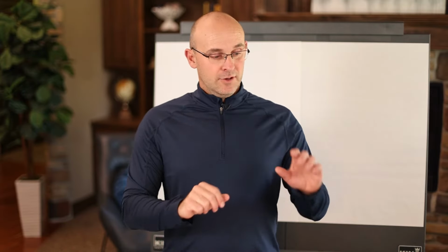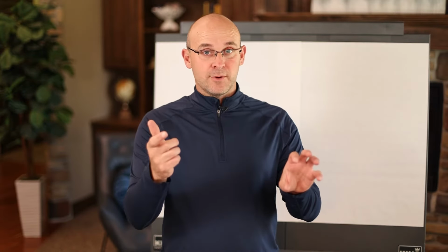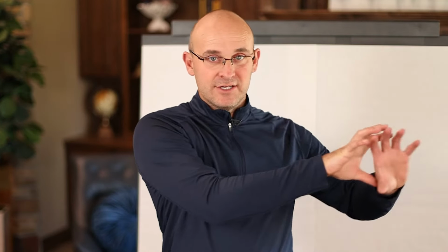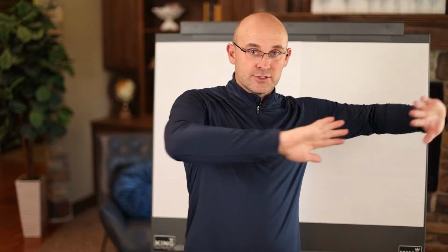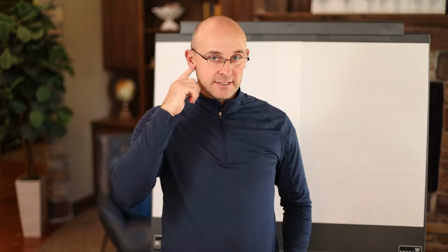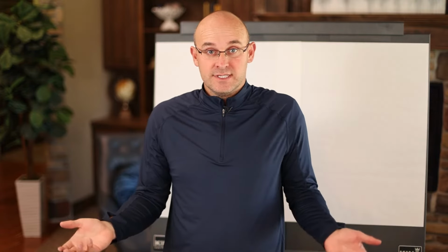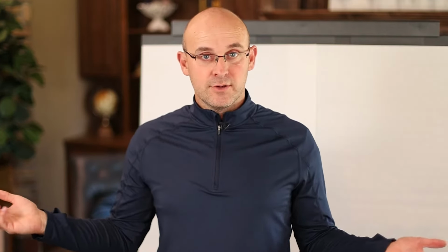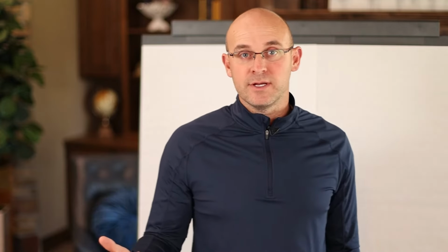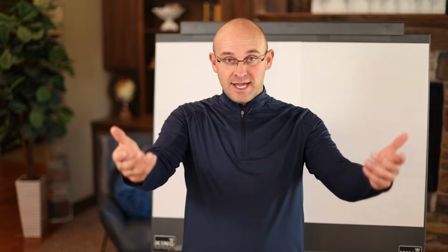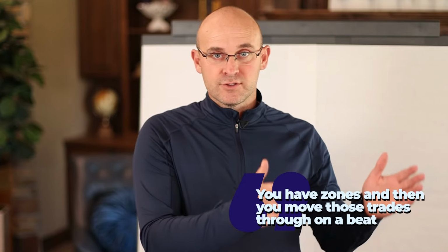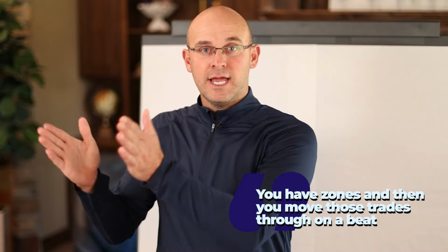And then if I said, we take trade partners, wonderful trade partners that we partner with, and we put them in a sequence, 1, 2, 3, 4, 5, into a train, and those trades move from zone to zone throughout our project, what would you say? Yes, you said yes. You break a project up into zones, and then you take a train of trades and you move through those zones. That's how we build. Yes, that's takt. It means that you have zones and that you move those trades through on a beat.